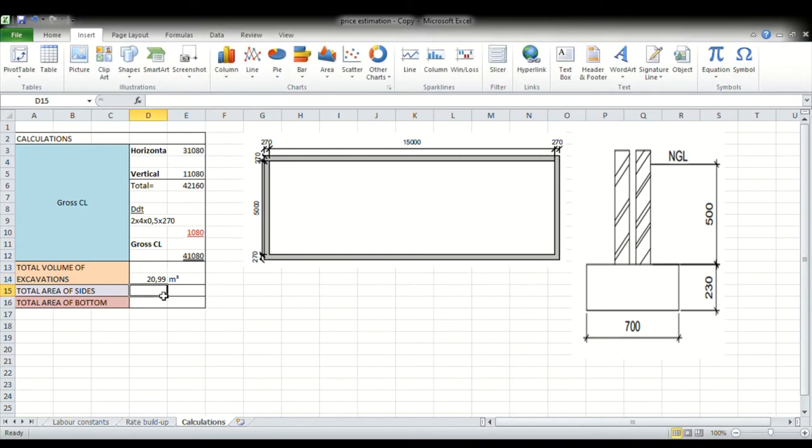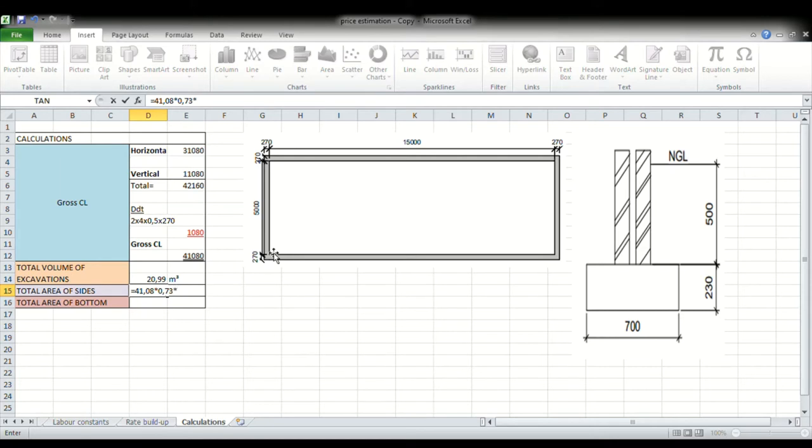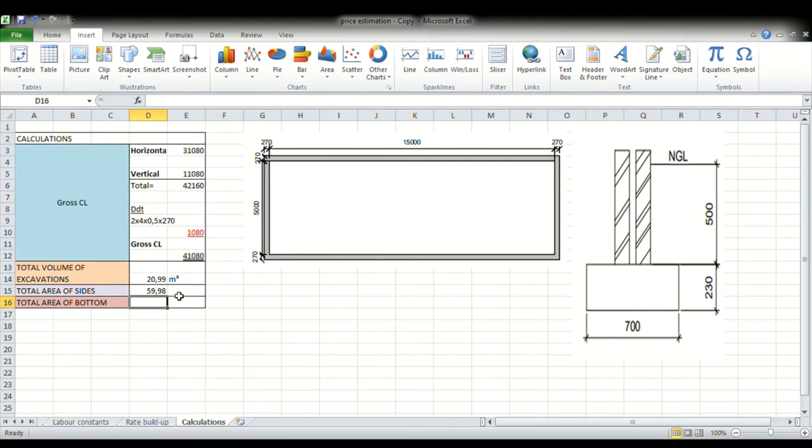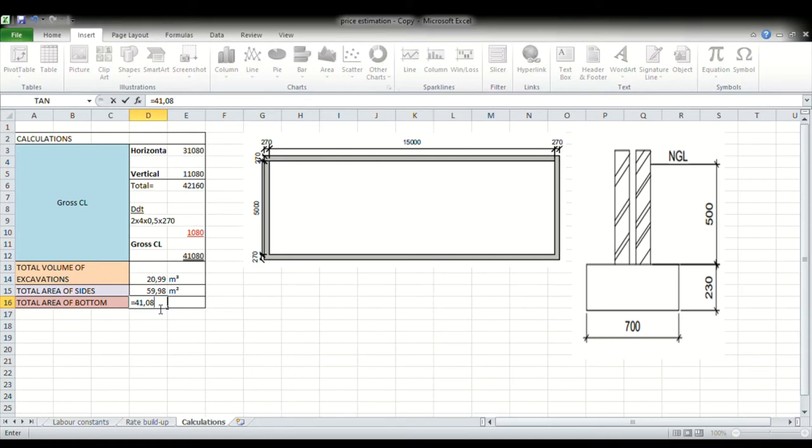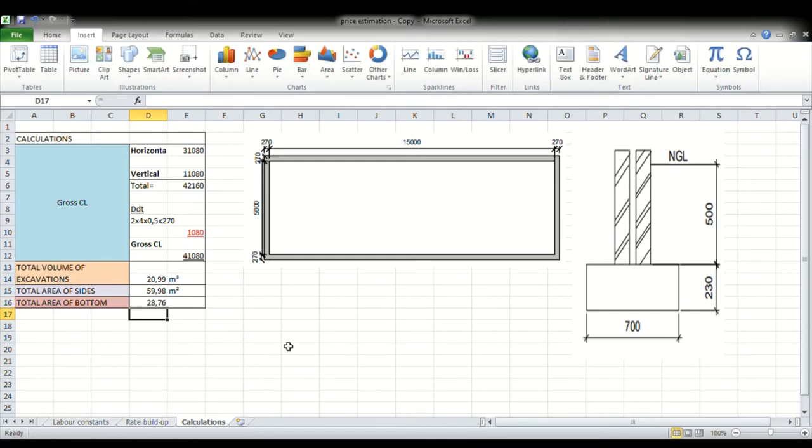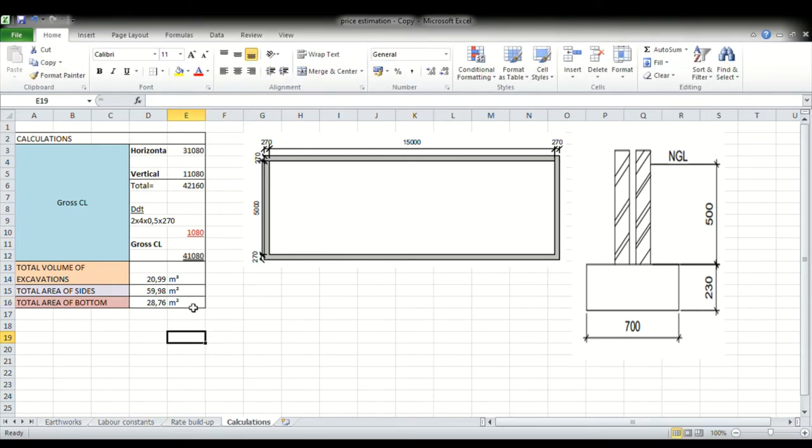Now when we get to the total area of our sides, that now means that you're working with two dimensions, so it's not cubes. So we'll take the center line, 41.08, and then we will multiply that by 0.73. And this is to the sides, right? It's like how you calculate for your risk of collapse. So we'll multiply by two because of the two sides. And okay, now total area of bottom, same story. We will take our gross center line, we multiply it by the width of our excavation, 0.70, and that gives us 28.76 square meters. Okay, these are basically just our preliminary calculations.